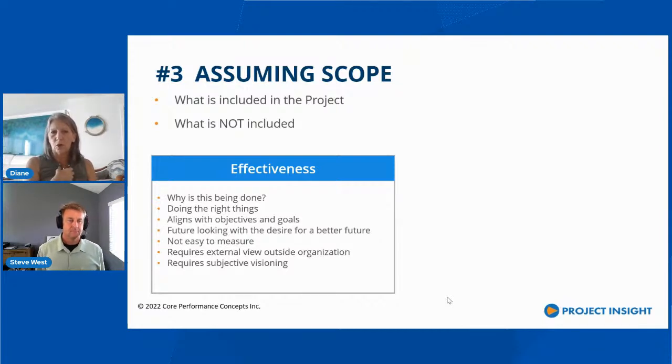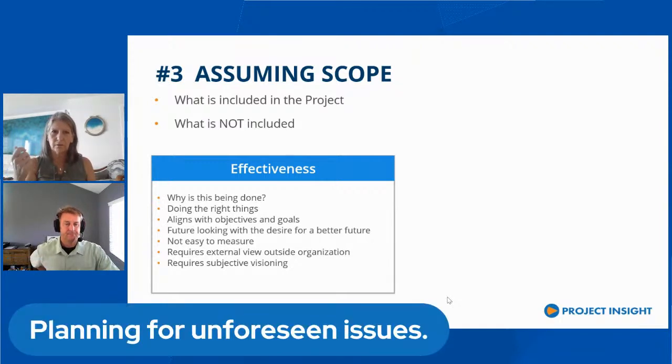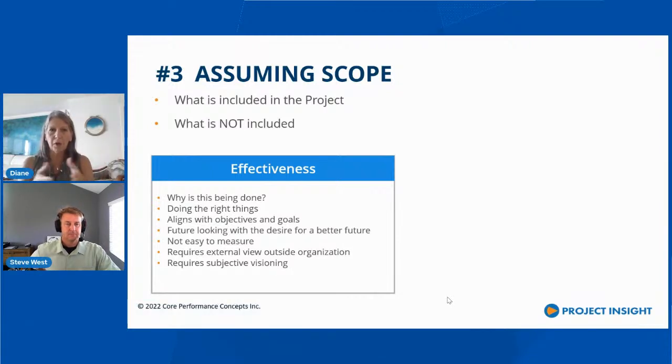In the company that I work with right now, their risk area depends on the resources that are implementing the project. If they're newer resources, you're going to have to plan a little bit more. If they're seasoned vets, not as much. So it's more about who's working on the project to do that adjustment, versus doing it generically across all projects. That's good. We're talking about scope, and how you're going to manage some of these changes, and things will pop up.